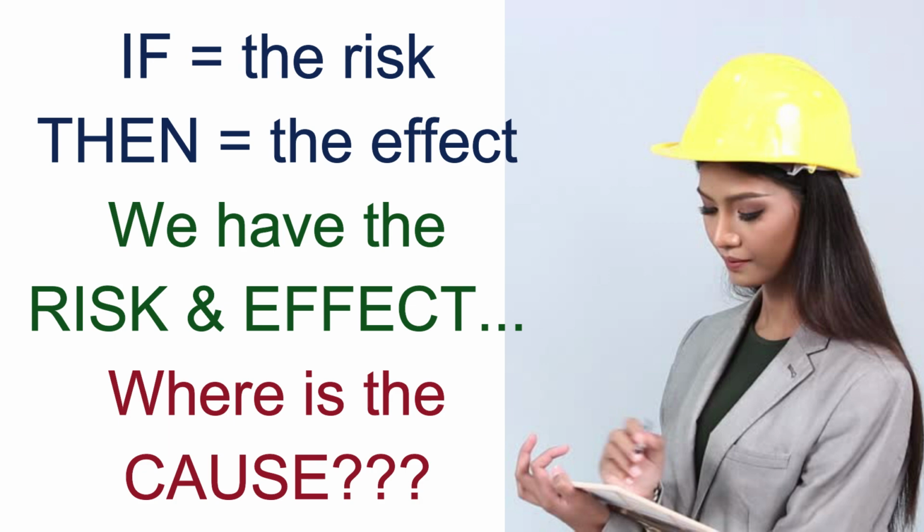But if it has been varying for the last year or two, or even the last 6 months, then your boss listens, right? Because you have a base, or you have something you can claim against and say, this is the reason I have this risk listed. If that background wasn't there, then the risk would not be believable. That background is the basis, the cause for why you think this risk exists.